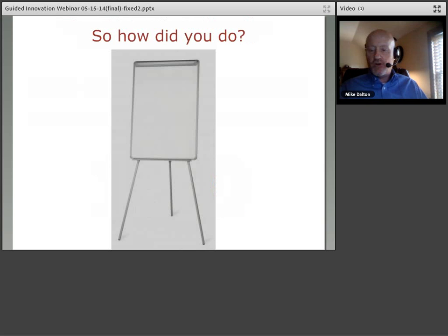Right? And so this is a PERT chart, or a version of a PERT chart with a series of tasks and durations attached to them. And at first glance, you'd look at this project and you'd say there appears to be 72 days worth of work here. But as with almost all plans, there is 50% or 36 days of padding hidden in this project. And if you're wondering where, it's at the individual task level.